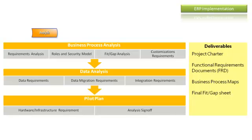Finally, the analysis sign-off is obtained. The deliverables of the Analysis phase include the final project charter, a Functional Requirements Document, a business process map drawing all business processes in a flowchart from high level down to a very low level of detail, and the final fit-gap analysis sheet identifying which requirements fit application functionality, what the gaps are, and how those gaps will be handled as solutions.